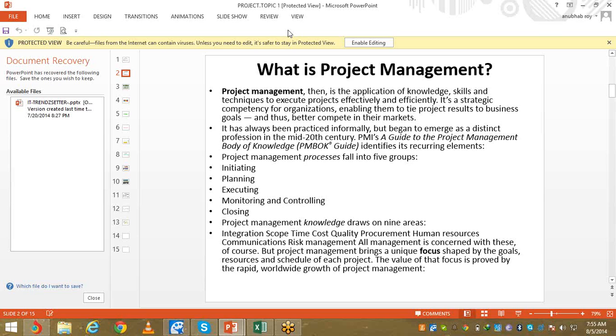Now the time, cost and quality. This is a very big factor indeed. Because if the budget the client has provided doesn't match your requirements, for example the client wants the work done within 10 days and you have to give a manpower of around 7 people, then what the company does is calculate the costing of the 7 employees for 10 days.